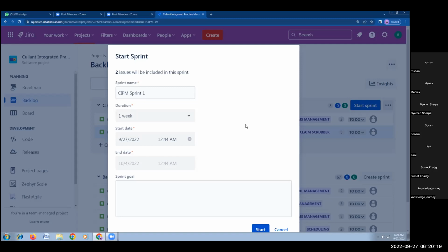Whoever has given the highest number first will be taken aside for some time. Next, the same user story will be rotated among the team members and we look for commonality. Normally, we don't give more time. 15 minutes is the maximum time that will be given. Within 15 minutes, they have to reach a commonality about the particular issue.